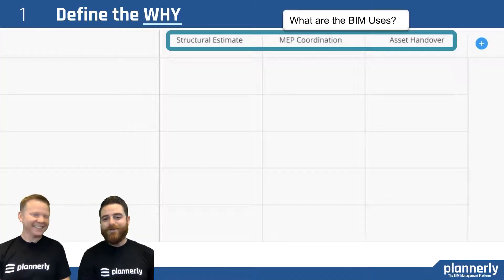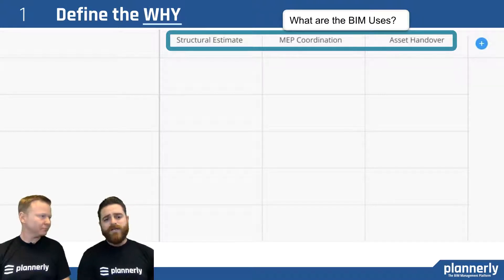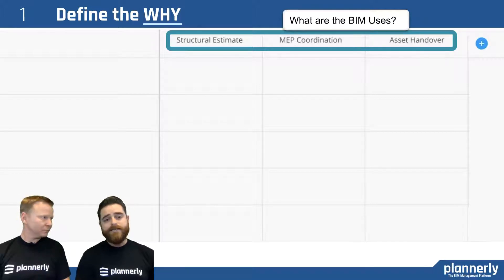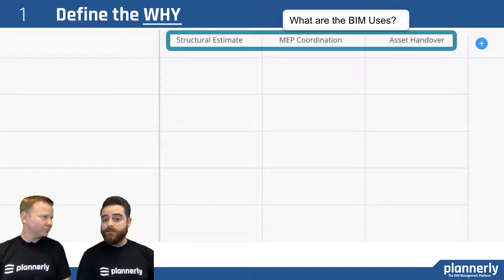The first thing we want to do on any scope is define the why. As we mentioned earlier, we want to define the BIM uses. What's the purpose? Why are we going to use BIM in the first place? If we have a complex design in this building, we might want MEP coordination to make sure we find enough constructability issues before we get on site.